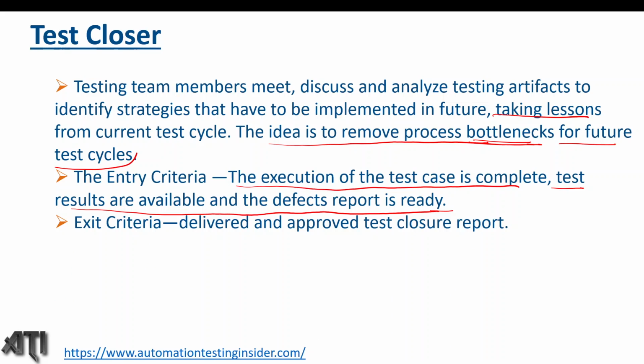What is the exit criteria? A delivered and approved test closure report. We should have the signed copy of the approved test closure report. Once it is signed off by the client, that is the exit criteria for test closure activities.